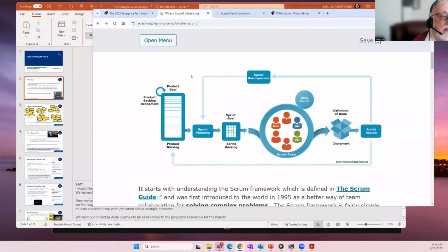The teams are given a backlog of work. This backlog on the left, this product backlog, and what's in this backlog tends to be work of the granularity of something that would add a new feature, say, to a piece of software, something that might take weeks or even a couple of months to do rather than something that could be done in days. So generally, these are called features in this backlog. When the team does some planning, they break that work down into smaller pieces for the 2-week iterations or sprints. Those pieces of work are typically called stories.